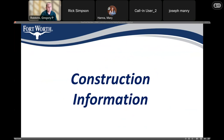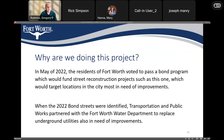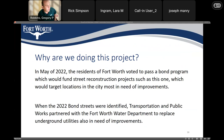Next I'll provide some information about the construction process to answer some frequently asked questions. Why are we doing this project? In May of last year, the residents of Fort Worth voted to pass a bond program which would fund street reconstruction projects such as this one, targeting locations in the city most in need of improvements. When these locations were identified, the Transportation and Public Works Department partnered with the water department and stormwater department to replace the underground utilities also in need of improvement.